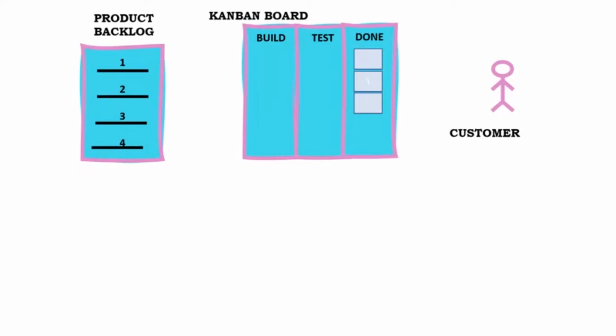Flow-based Agile has a different approach to stand-ups, focusing on the team's throughput. The team assesses the board from right to left. The questions are: what do we need to do to advance this piece of work? Is anyone working on anything that is not on the board?